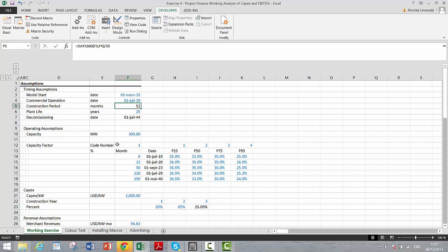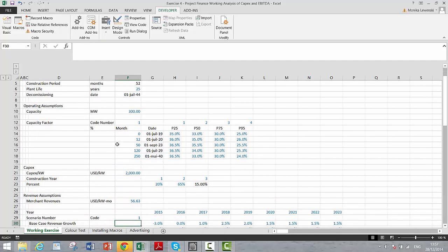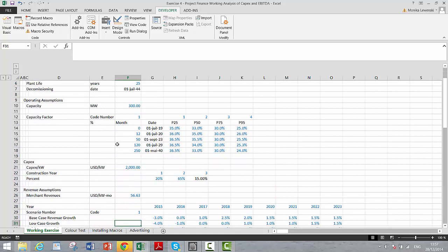Now, if you want to be really quite advanced on the project finance, you could make all your operating analysis on a monthly basis, but your project financing on a monthly followed by a semi-annual basis. You could also do your project finance on a semi-annual basis, but then you would have to only have the repayments occur in specific periods. Either way, it's okay. All right.